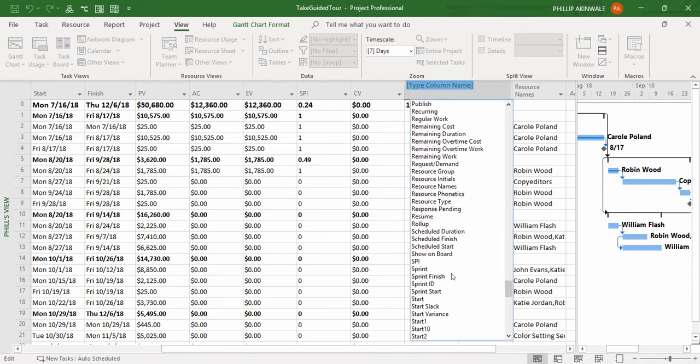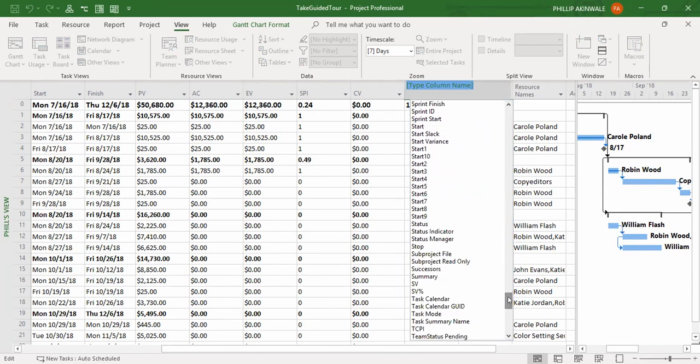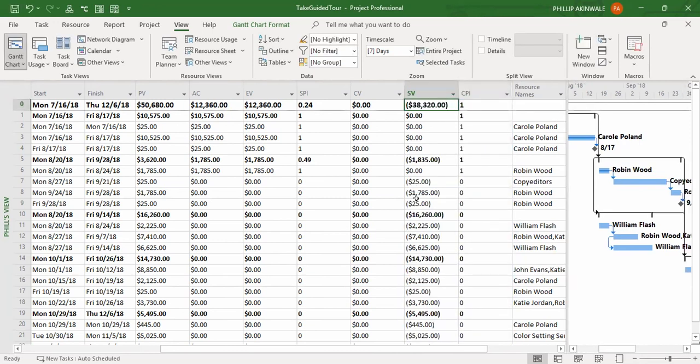So let's look for the schedule variance, the SV, way down here. There's your SV. And the moment you put SV in, you can see there's a variance. See? So you're $38,000 behind schedule on this project. Now, I know it's old, granted the dates are old, but this is just for illustration purposes. And that's what you do in control cost.